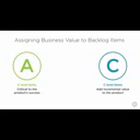A-level items are those items that are critical to the product's success. Maybe they set the product apart in the marketplace or close some longer-term gap in strategy. While C-level items are those items that, while they may add incremental value, aren't near as critical as the A-level items. Maybe these items further enhance the usability of a feature which is already performing well, or they satisfy a certain request from a specific customer.